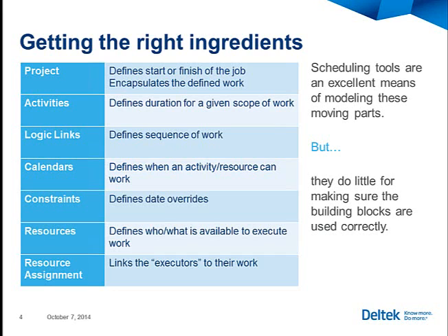Logic links. Every activity falls somewhere in the project. Every step in bringing a recipe into a product, into that cake, has to be done in a logical sequence. I can't bake the cake until I put the ingredients together and mix them a certain way. I have to use the right mixer depending on what I'm making, either a hand mixer or an automatic mixer. Automatic mixer. See, I don't even know what these things are called. Electric mixer. If I decide just to list the activities and not list them in a logical sequence, I have a list. I don't have a schedule or a project. Schedule by its nature implies that there is a sequence or a right time to do certain things. Well, if I don't have that schedule, I don't know when I'm doing certain things.